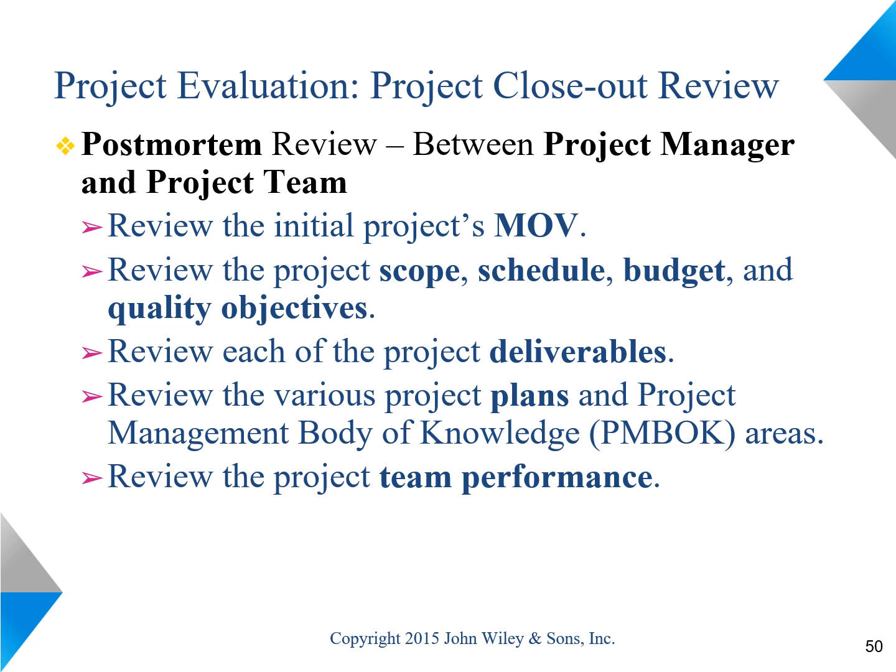Another way projects are evaluated is by the project manager and the project team members. These are typically referred to as post-mortem reviews or project closeout reviews. Basically the project team goes through all aspects of the project: MOVs, the scope, the schedule, budget, the deliverables, and the plans that were put in place and how they were executed. It becomes a learning experience for all of the team members in terms of recognizing what they did well and what are some of the things they could have done better.